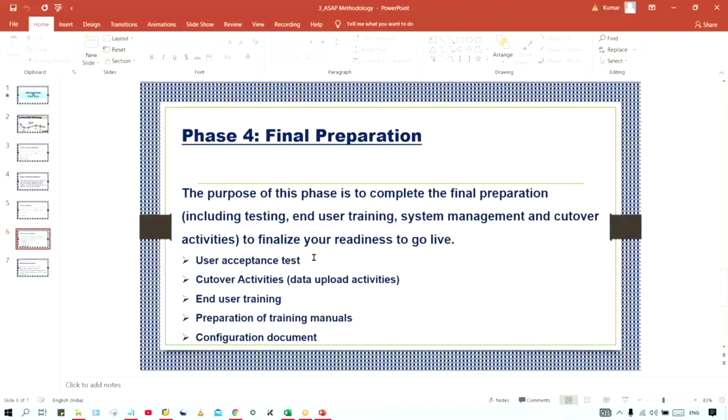Okay. So anyway, user acceptance test means client will perform testing, and if they're going to demand anything for which any development is required, immediately your project manager will say that it requires development because this is not the part of standard process. In that case, we have to bring some extra resources that is going to cost you extra.